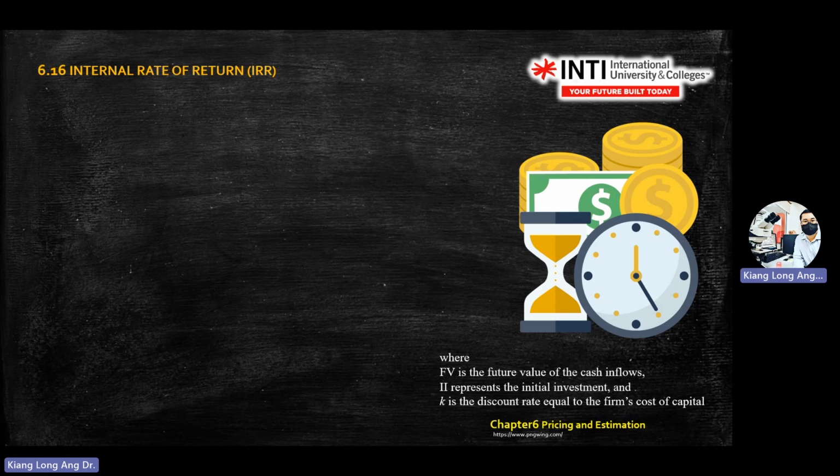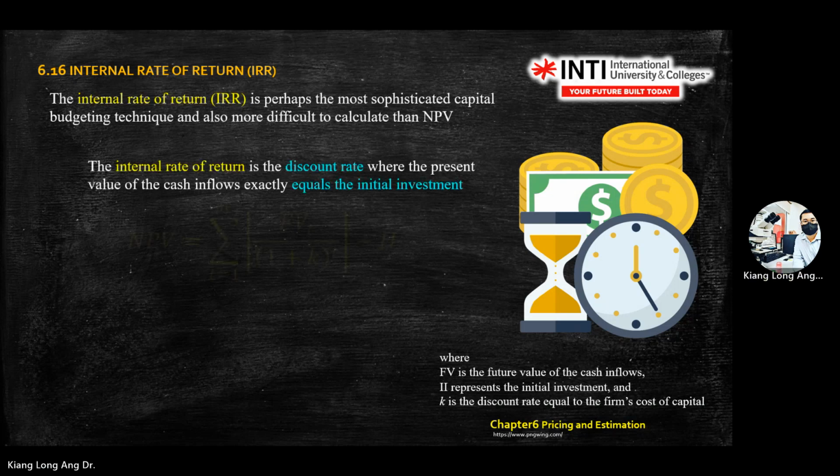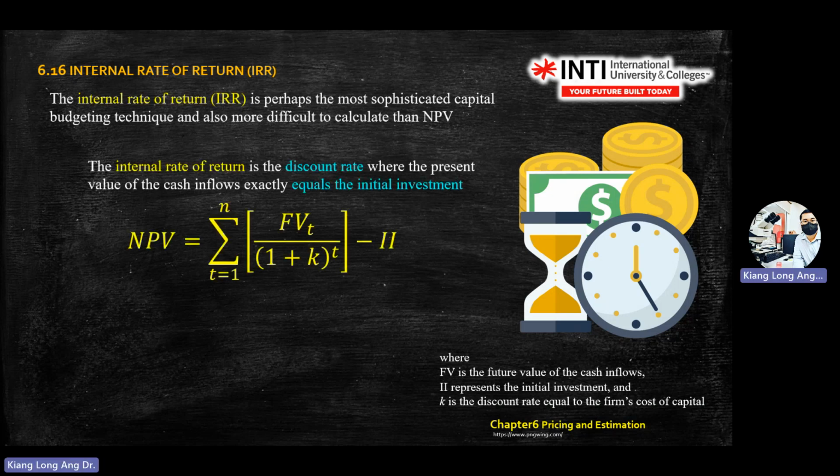Okay. So what is IRR? IRR, internal rate of return. It has another formula, right? So what is internal rate of return? You use the formula that you used to calculate NPV. To cut short, your NPV equals 0. The left-hand side equals 0. It's like in engineering, statics and dynamics, the equilibrium equation: all the forces equal 0. In this case, your NPV equals 0.